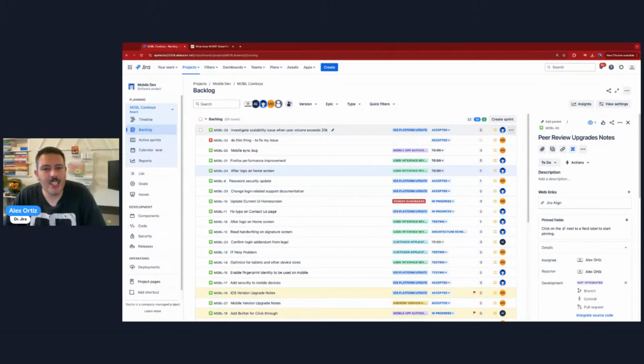This is a little bit more of a negotiation between your product owners and even your software technical leads, because they may have new information. So don't ever just blindly bring stories into your sprint. Talk about them. You should have some sort of a grooming or refinement session before your sprint planning with a couple of key stakeholders to make sure that this stuff is in order.